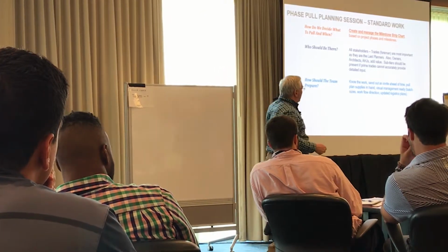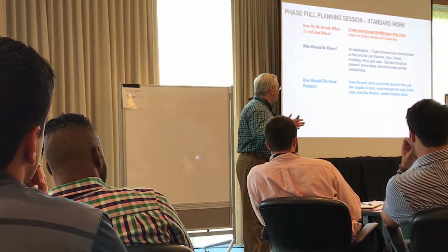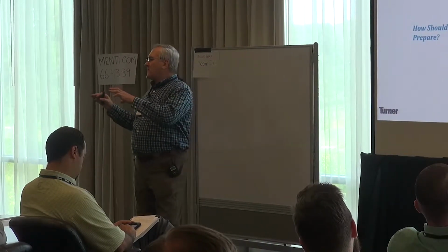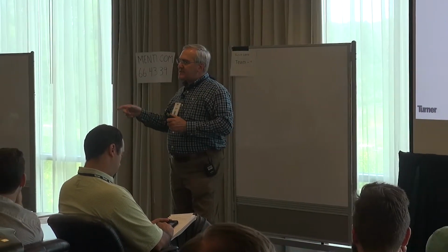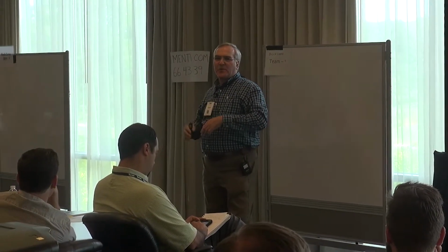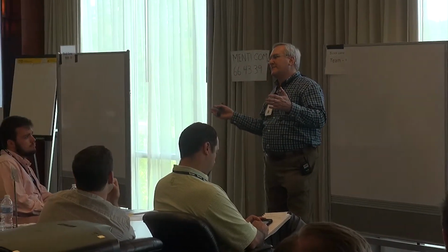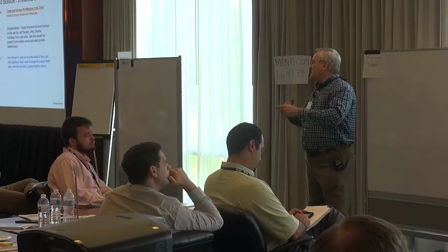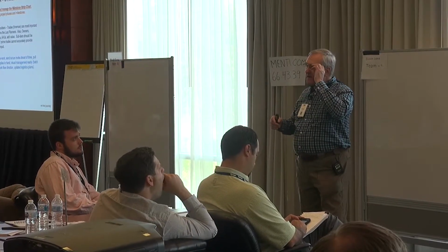So they need to have all their supplies in hand. We have a checklist for that. You need to clearly understand the batch of work and the flow that the work is going to happen. Are we going clockwise? Are we going counterclockwise? Are we working north to south, south to north? That has to be figured out ahead of time, right? And Turner often puts the first cut at that strategy, that flow, right?